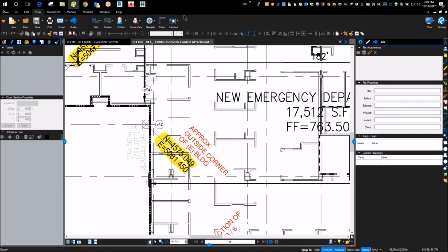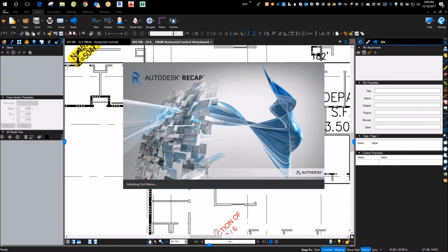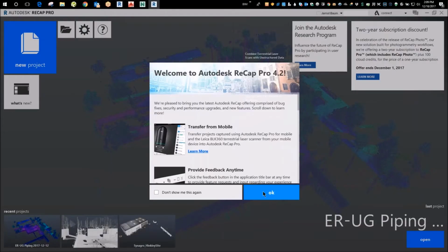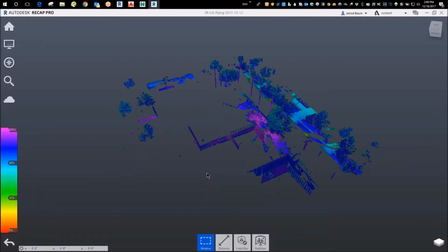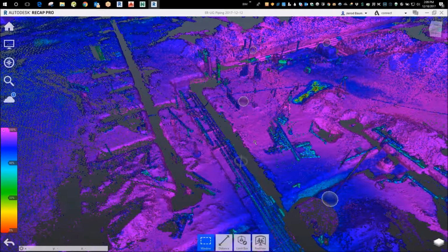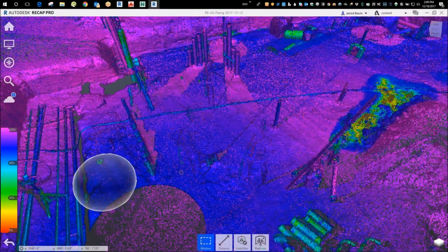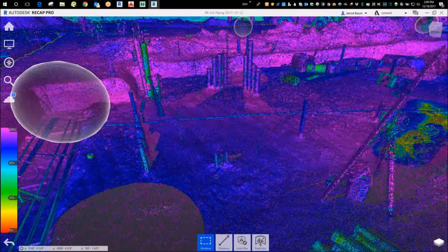The problem was, he had already laid this out weeks before, and they started stringing lines from it and laying out electrical. I would have thought the electrical would have found it sooner, because we went out there and laid out for them the corners of this room via the total station. So if you can see these conduits here, I'll show you. Oh, sweet. You got two people standing there. Yeah, there's all kinds of guys moving around on site.